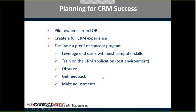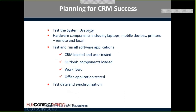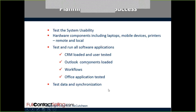Make sure your pilot people are from the line of business. Create a full CRM experience — take them through a day in the life of a sales rep and how they're going to use it. Look for feedback and make those adjustments. Test the system for usability — don't just test it online. If you've got tablets, phones, and different browsers out there, test those too. Make sure you try to get everybody on the same browser — supporting many browsers with CRM online can be tricky. Also make sure people haven't downloaded a bunch of add-ons into their Outlook. Test CRM load, user testing, Outlook workflows, and if you're integrating with Office or using data synchronization, test that as well.